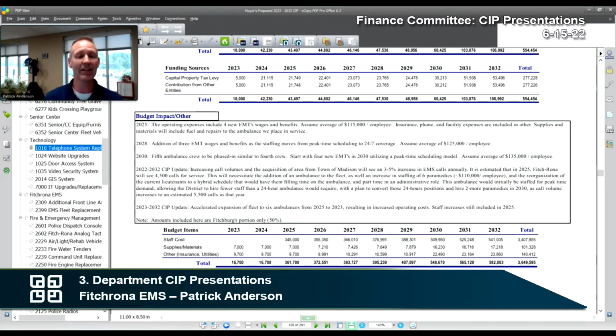Again, I have not committed to everything. We don't sign on the dotted line until the day it goes into production, which means it will be mid to the end of next year before we even see that and they say, do you want us to build it? Yep, that's when we sign for it. But again, we don't pay for it until it's delivered.